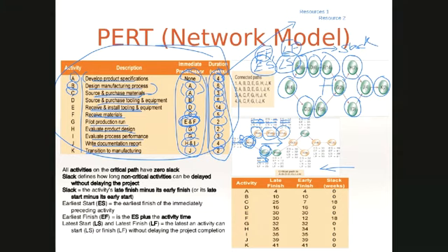On the other hand, F begins only when C ends. C ends week 7. That's the earliest finish for C. So earliest F can start is going to be week 7. It takes 5 weeks to do that, and then earliest finish is week 12. So you know that this is an important time for us to take a bit of a breather and understand this bit. So now we're going to head into G.